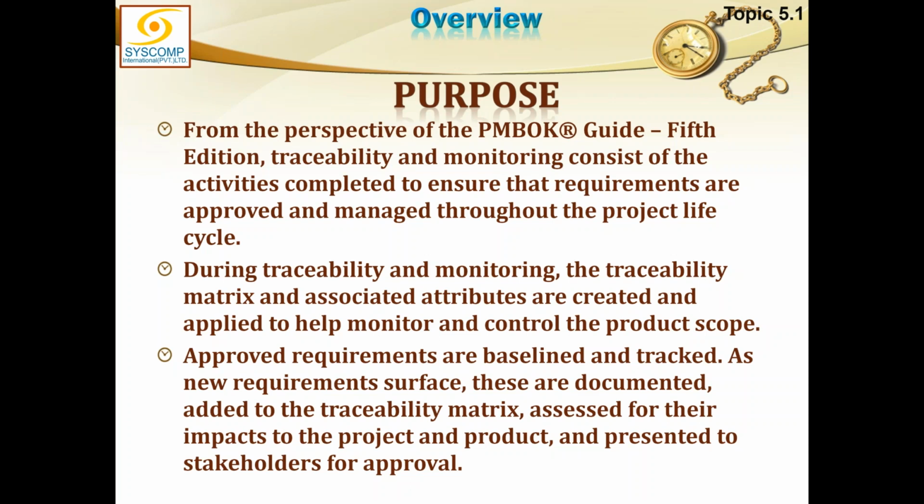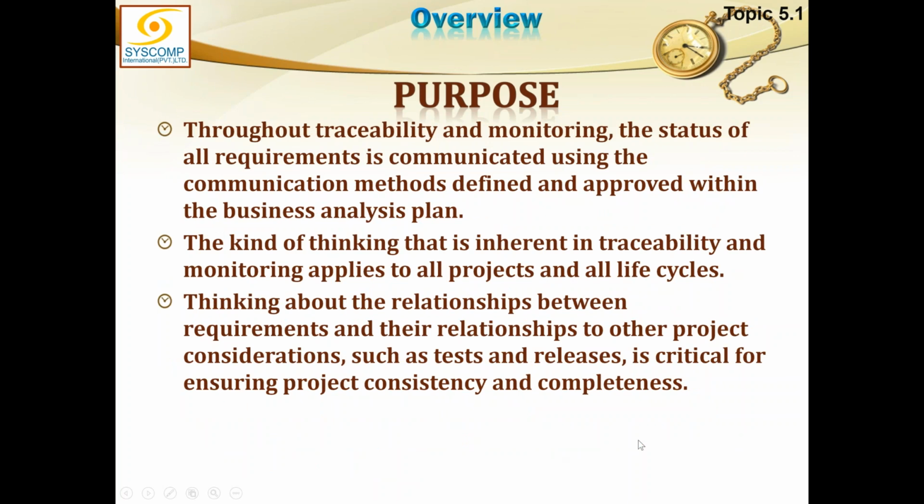As new requirements surface, these are documented, added to the traceability matrix, assessed for their impact to the project and product, and presented to stakeholders for approval. Throughout traceability and monitoring, the status of all requirements is communicated using the communication methods defined and approved within the business analysis plan.